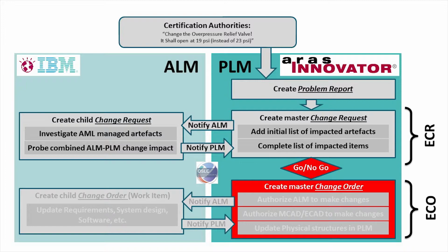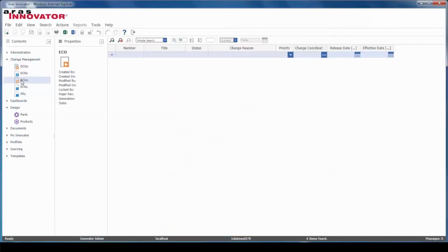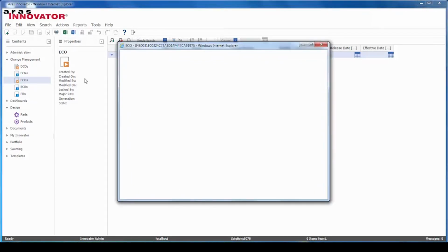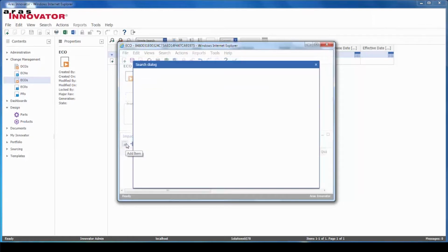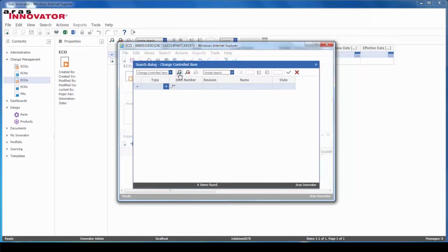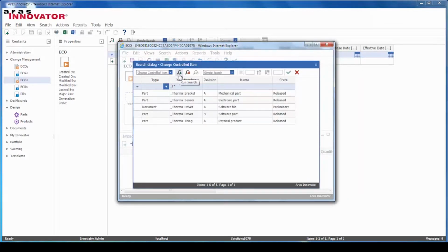Next, the project management team decides if an ECO is warranted. If the ECO impact analysis does not fully justify implementation of the changes under consideration, the PLM ECR-ECO process has reached its end. Otherwise, a new ECO is initiated in PLM. The purpose of the ECO is to manage implementation of changes.